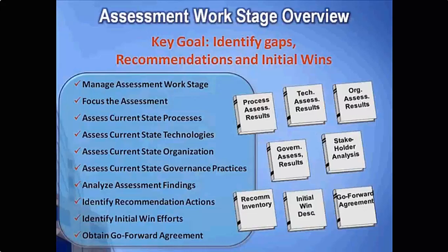Here's an overview of the key work steps within the IT service management assessment effort. We're obviously going to manage the assessment work stage as it moves forward. We're going to focus our assessment in areas that are applicable to the scope and the vision that we decided in the ITSM visioning stage. We're then going to conduct assessments for processes, technologies, organization, and governance practices. We'll analyze the findings from all those assessments, identify recommended actions, translate those to initial win efforts, and obtain a go-forward agreement to move forward with those efforts. And that will be the essence of our implementation.